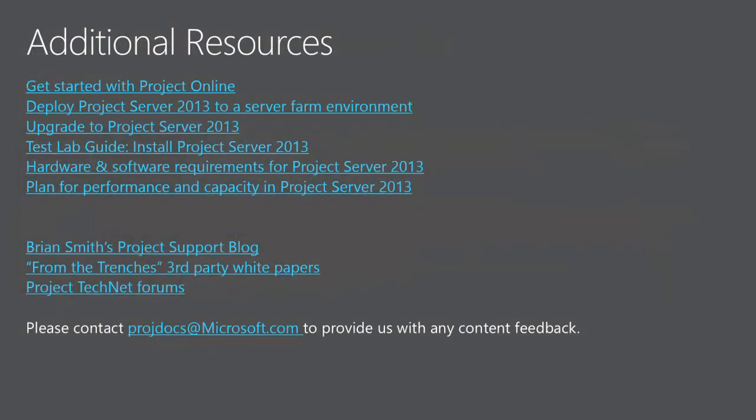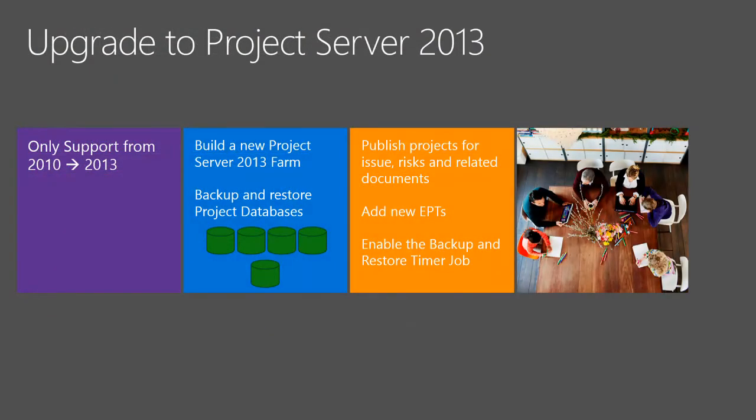And you would take your 4 Project 2010 databases, back them up, restore them on the new farm, and run the PowerShell command, which would make another database that has a copy of all 4 of those databases in it. So you have updated the content database using SharePoint's methodology, and you've merged the 4 project databases into one using our methodology. And then your site collection and your project PWA site have both been moved over to the new farm.